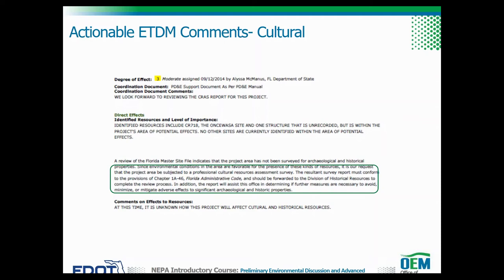In addition, the report will assist this office in determining if further measures are necessary to avoid, minimize, or mitigate effects to significant archaeological and historic sites." So in this ETDM comment, the Florida Department of State is telling the district that a cultural resources assessment survey must be completed for the project. This is good information since it will be utilized in the preparation of the scope of services for the PD&E study.